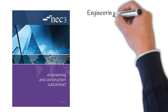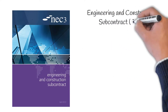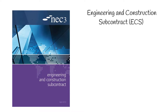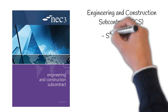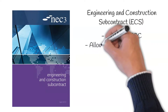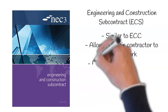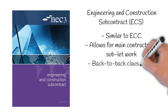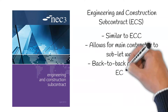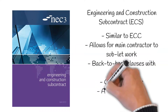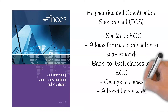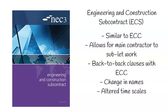Engineering and Construction Subcontract, or ECS for short. This contract is very similar to the above. However, it allows for the main contractor to sublet part of the works of a project to a subcontractor, allowing for back-to-back clauses. The only difference is a slight change in names, i.e. contractor and subcontractor, and timescales are altered to facilitate the timescales required in the ECC contract.